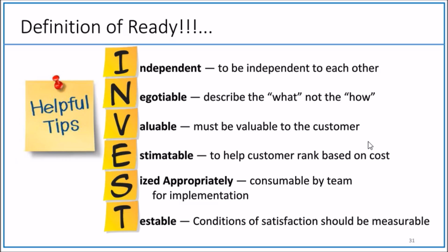Then I said, look, you have to go back and say, as a team, definition of ready is not met, so please ask him to rework on it, and you can't take it up for the sprint. So unless the definition of ready criteria is met, the team cannot take stories. Team can proudly reject the stories saying, product owner, these definition of ready items are not met.